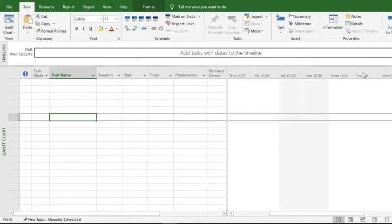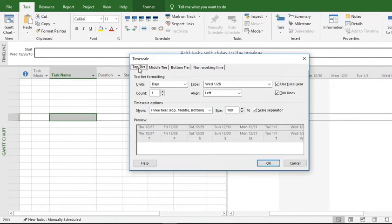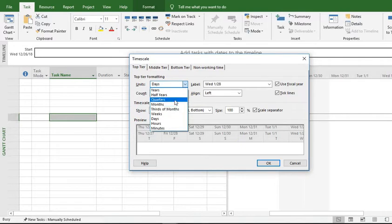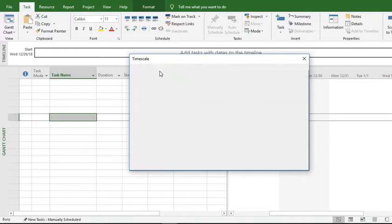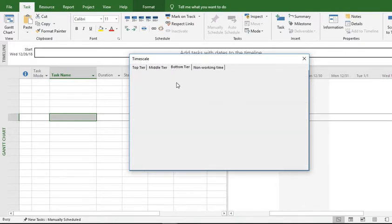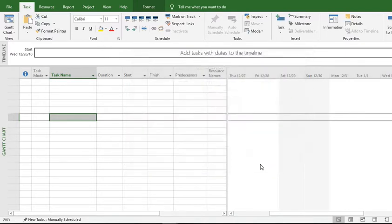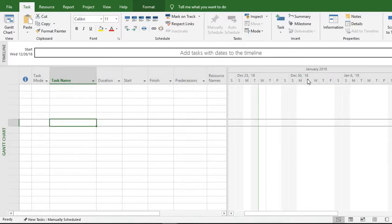You can see the time scale is now on days. If you want to change it to three scales, let's make it three scales: the top tier should appear in months, the middle tier should appear in weeks, and the bottom tier should appear in days. You can see now the bottom tier is in days, the middle tier is in weeks, and the top tier is in months.